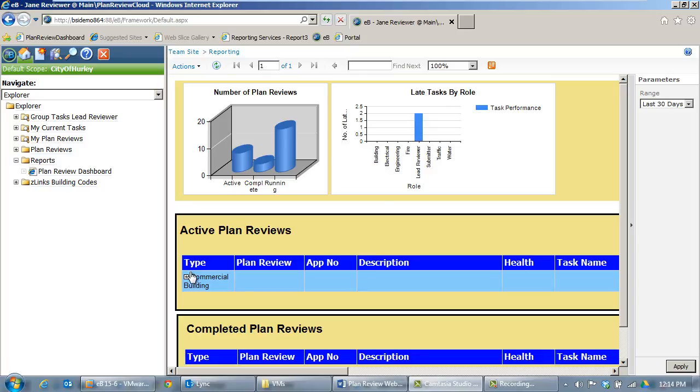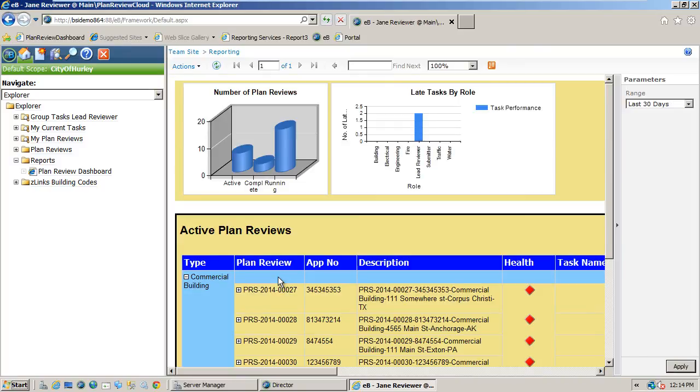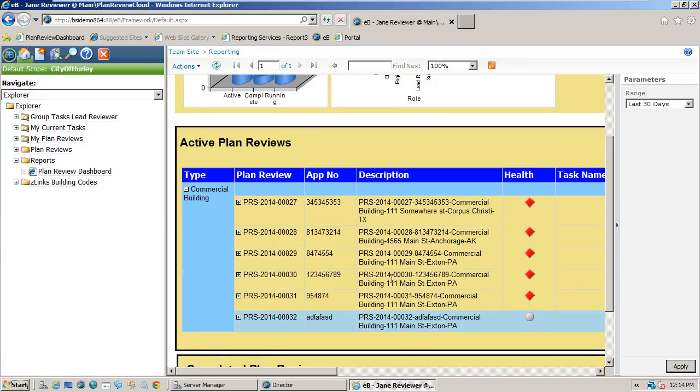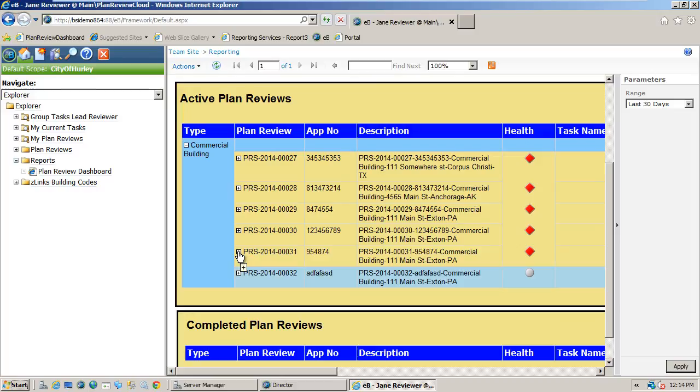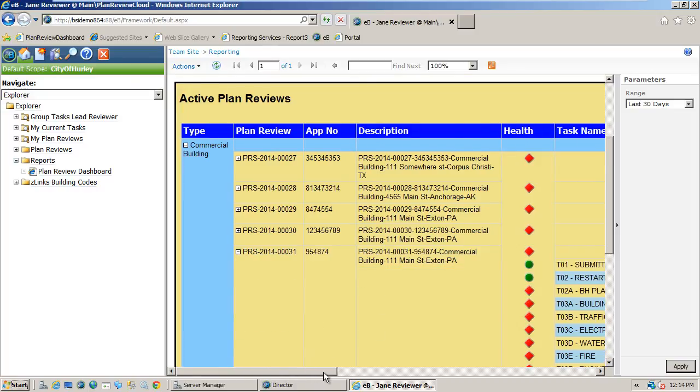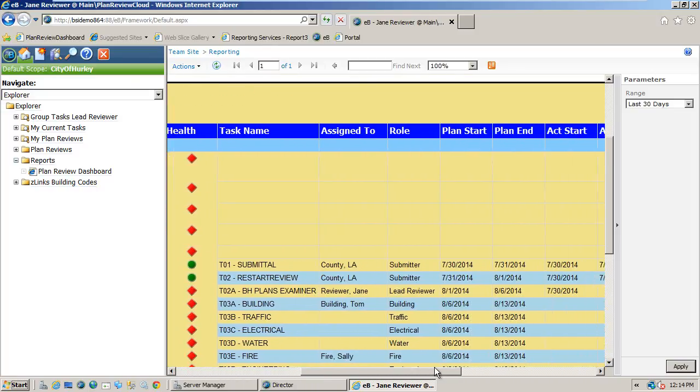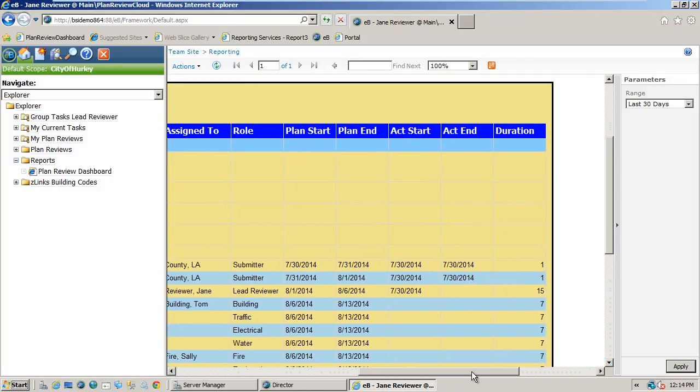Then, if we expand the commercial building category under active plan reviews, we see a list of running plan reviews with a health indicator showing which ones need attention. We can then drill down further and see this review has been stuck with Jane Reviewer for 15 days causing the whole plan review to fall behind.